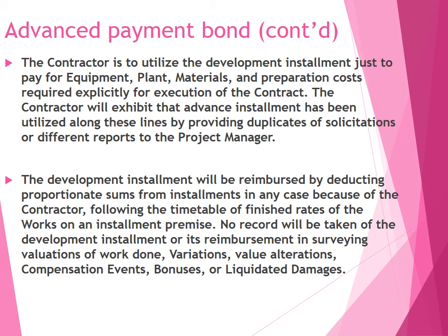The contractor will demonstrate that the advance payment has been utilized by providing duplicate documentation to the project manager. The advance payment will be reimbursed by deducting proportionate amounts from the installments due to the contractor, following the schedule of completed rates of the works. No account will be taken of the advance payment or its reimbursement in assessing valuations of the work done, variations, value alterations, compensation events, bonuses, or liquidated damages.